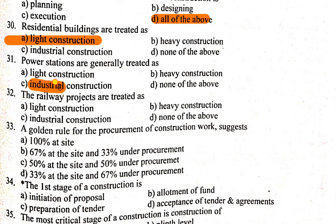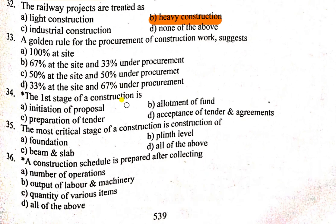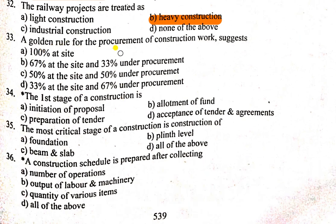A golden rule for the procurement of construction work suggests that in any construction site, 67% of the material and resources are on site and 33% are under procurement. So the correct answer is option B: 67% is on site and 33% is under procurement.